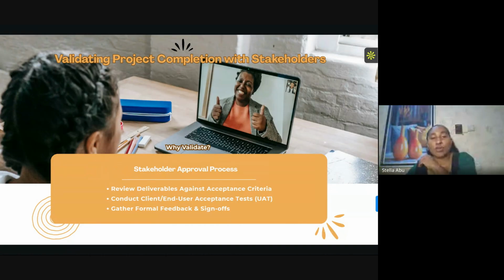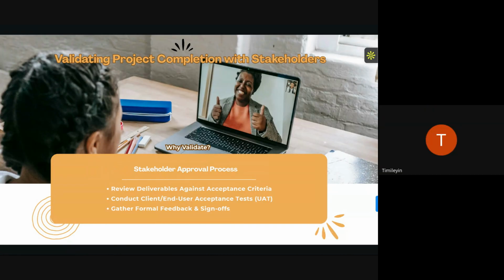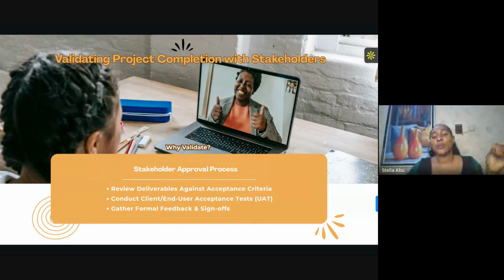I'm sure if I ask all of those things, you tell me you forgot it. But some of the things about scope, what a project entails and what it should not entail, right? We have all those clear, and then some constraints of the project, and why this project should exist, the deliverables and things like that, in simple words. Now, at this time that you are closing the project, you are supposed to go back and say, okay, based on this scope, have I been able to achieve this? What have I achieved so far? What did my stakeholder ask me to do?